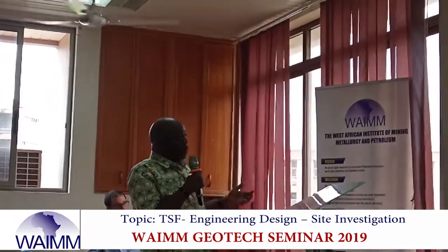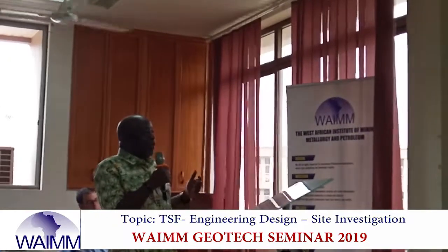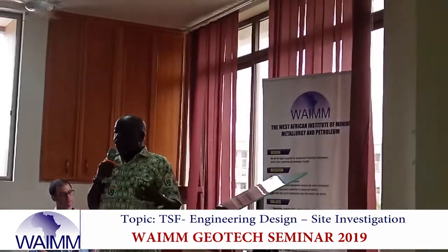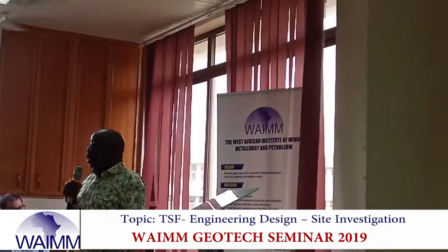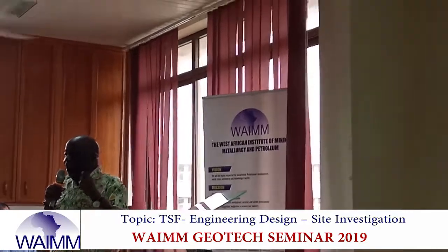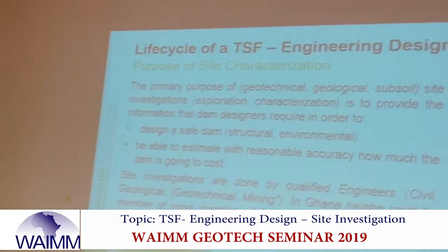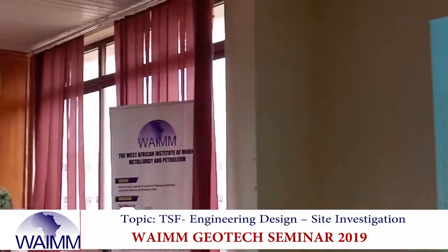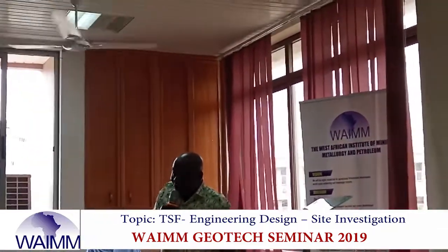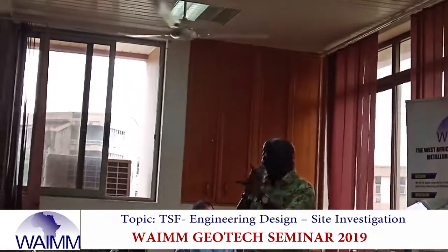Another purpose is to be able to estimate with reasonable accuracy how much the dam is going to cost. A good geotechnical investigation will provide sufficient data to be able to make an estimate of the material that is going to be required, and of how much clearing is going to be done at the basin, how much bad material will be removed from the basin, how much topsoil is going to be taken.